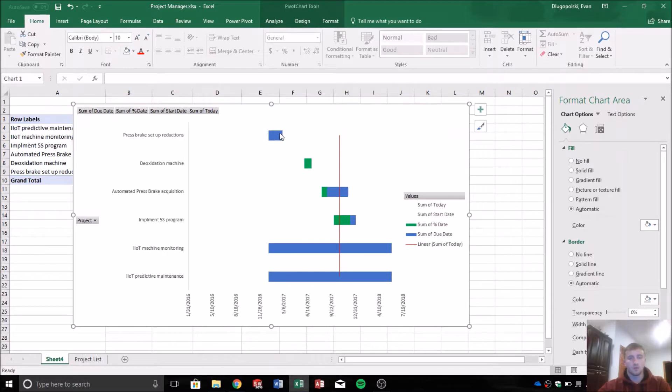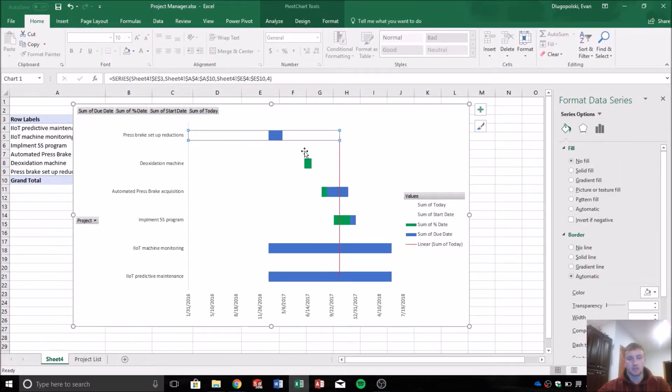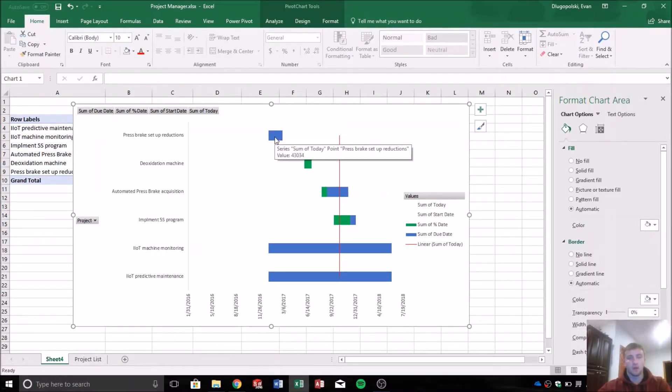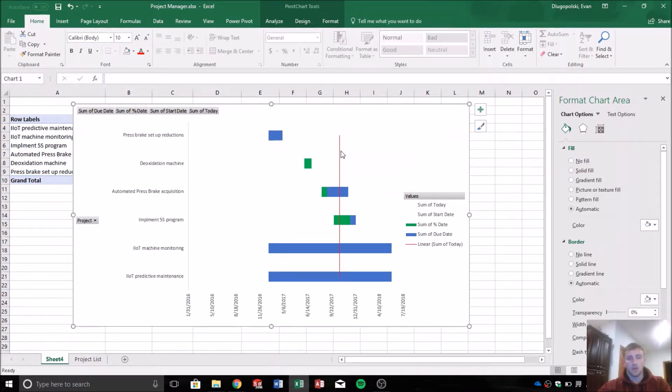So for example, we can see that this project hasn't been started. It's not complete, nothing. So it's definitely way behind schedule, it's overdue. The due date was here, today is here.